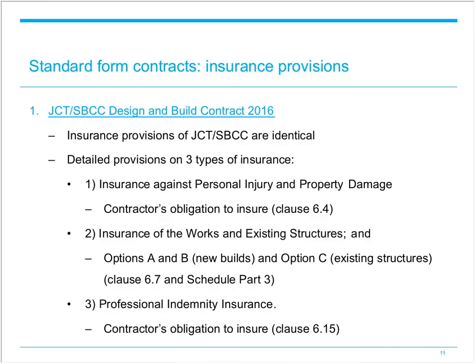The 2016 edition is more flexible as to who provides cover under Option C, as it can be difficult for an employer to arrange such insurance if, for example, they are only a tenant or owner of a domestic property. All-risks insurance covers any physical loss or damage to work executed and site materials. However, despite the name, such insurance rarely covers all risks — for example, JCT and SBCC contracts exclude wear and tear, property defects, and acts of terrorism.